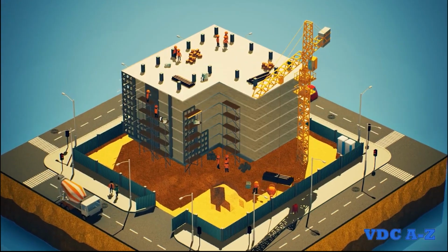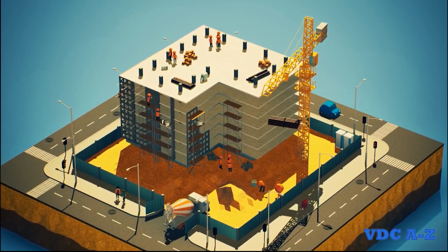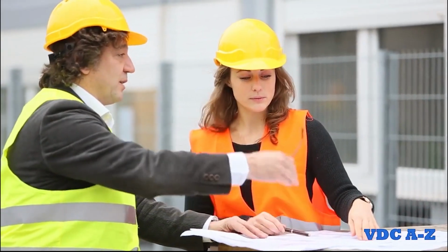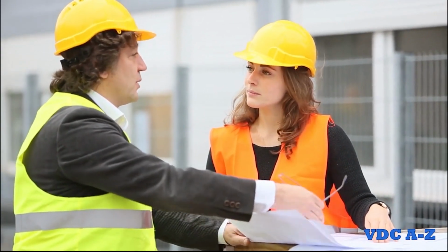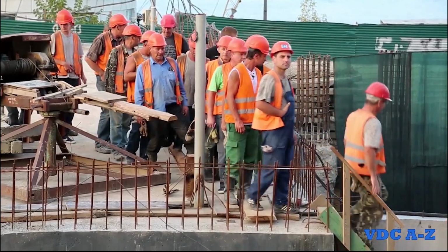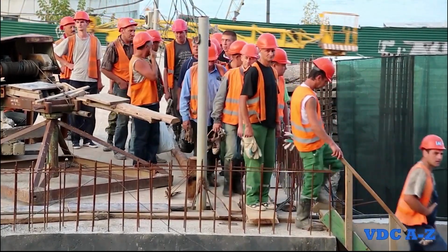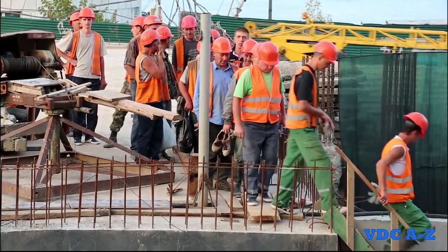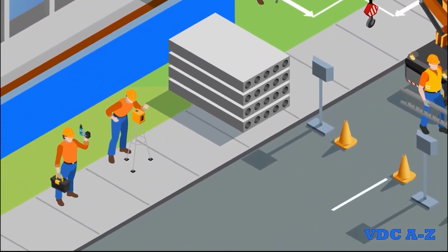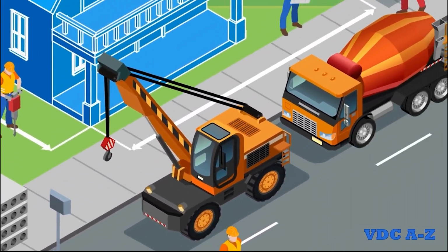For example, by creating digital representations of the site, planners can carefully analyze the arrangement of materials, equipment, and personnel. Through this process, safety managers can proactively address safety concerns before and during construction. They can pinpoint access issues that might arise during different phases, ensuring that workers have safe pathways and clear access to the work areas. Additionally, the BIM model allows them to assess how construction sequencing might impact safety measures, enabling adjustments to be made in order to mitigate possible risks.